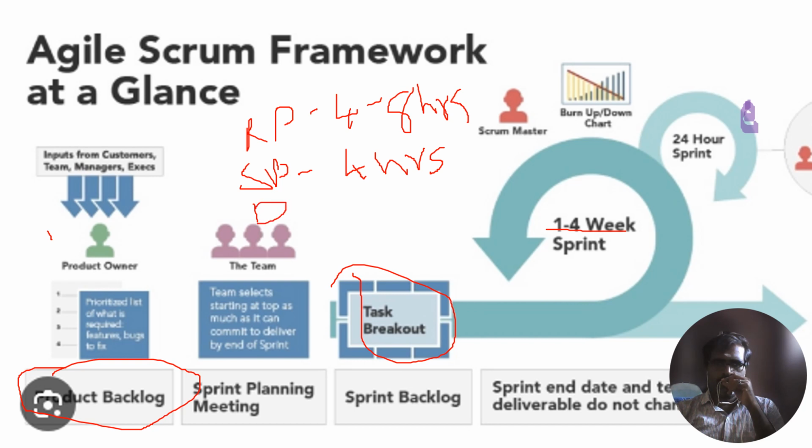Next comes the sprint retrospective meeting, defined in the Scrum. The sprint retrospective meeting is the last event of the Scrum we need to consider. It should be held after the sprint review. In this meeting, we invite only the Scrum team to discuss what went right and what went wrong during the just completed sprint.